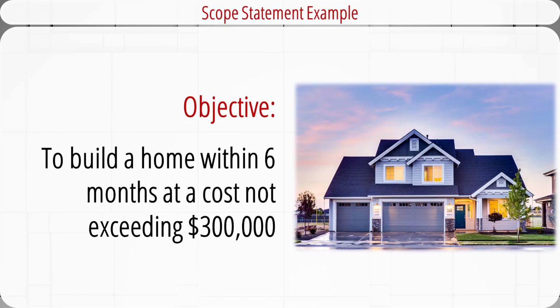Let's see an example of a project scope statement. The project objective is to build a custom house within 6 months in Binghamton at a cost not exceeding $300,000.